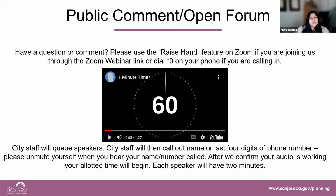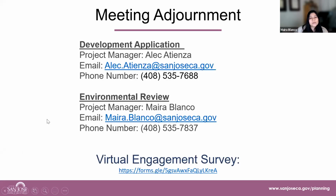Yeah, Alec, I can provide some additional information. I just want everyone to know that the EIR is currently in the preliminary stages. We are, just for a visual, putting together all of the ingredients that will go into the EIR analysis. I have noted all of the transportation concerns. Just for some context, and this is also available on the city's website, the transportation analysis will be prepared consistent with Council Policy 5-1, which establishes the thresholds for transportation impacts under CEQA.